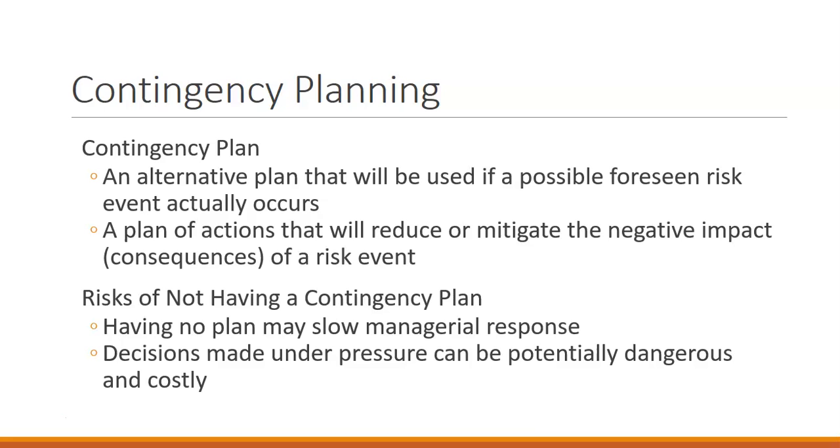If we don't have a contingency plan in place, we end up making emergency decisions, which are not always our best, most thought out decisions. We might not know who exactly needs to make that response. Then we have delays in a response. Any delay in a response can be expensive and costly. So we want to have those contingency plans in place to at least have the communication plans and the responsibility plans. If this risk occurs, who gets called, who's responsible, who makes the decisions.